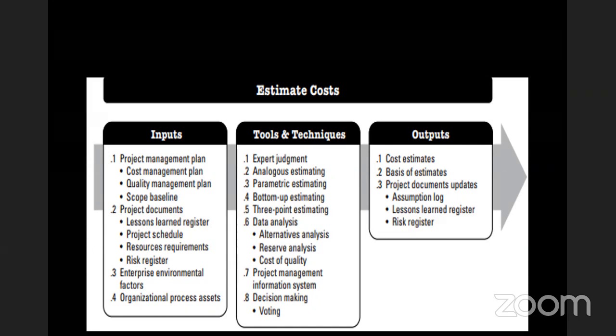And then in the process of plastering, you'll find that the mortar from the concrete will stain the roof. And because it's a stone-coated roof, it might be difficult to remove that mortar from it once it dries off. So if you do it the first time without knowing, you might find out that subsequently you may need to have plastered and maybe screeded, and if possible, maybe even painted before you put the roof covering, so that those stains don't come on the roof.